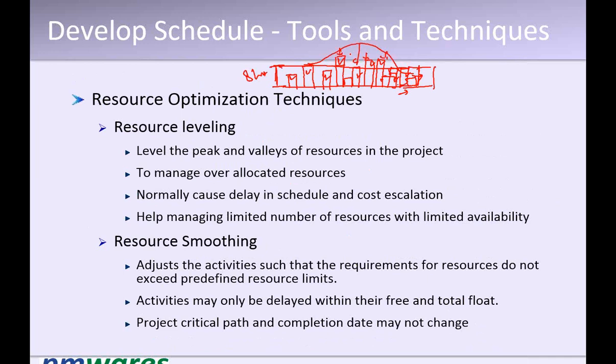No, that differentiation is not clear, because what I'm saying is, in resource leveling also it will extend the time. If the float is available anyway, the project duration will not increase. In resource leveling also, when I'm pushing those things down, it will extend the time of the project if there is zero float.